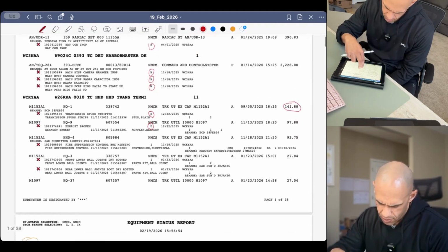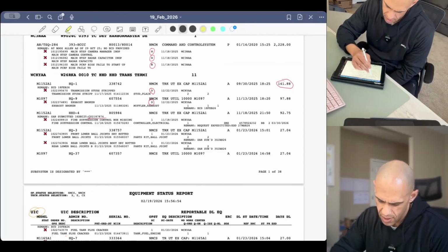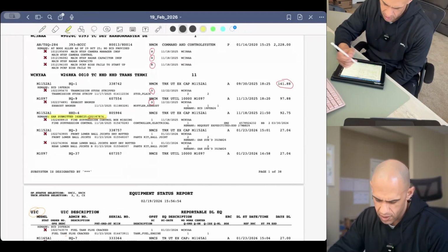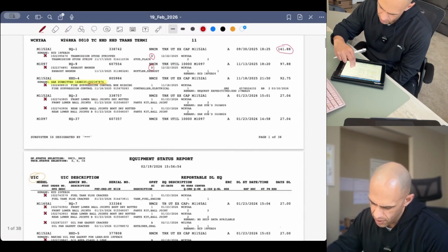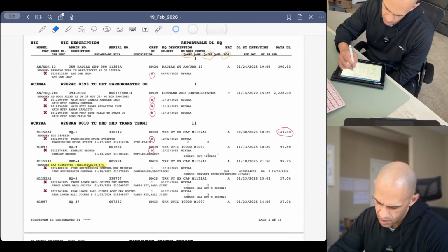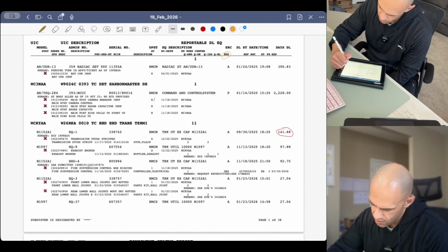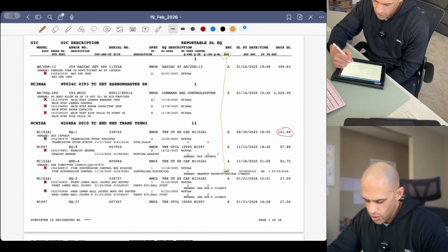Let's see if we can find another one we looked at here. The one, HHD4, SAR submitted 16 December, and this is a weird number right there. You might be asking yourself, what is SAR submitted? Supply action requests. So we're going to go back to the top. This SOS up top stands for source of supply. Right here, this is our source of supply. When you have a source of supply of SMS, you can submit a SAR, a supply action request. And that's what they did.